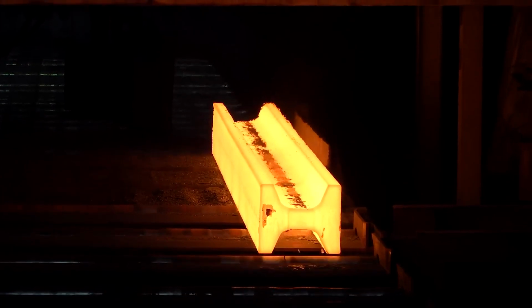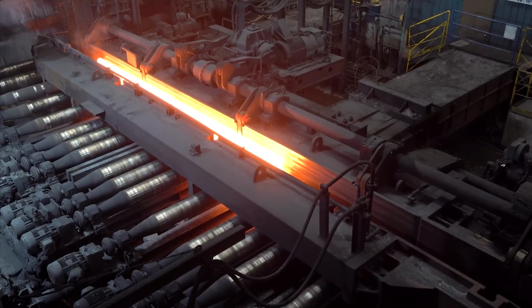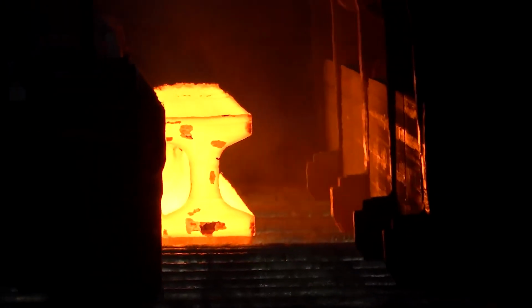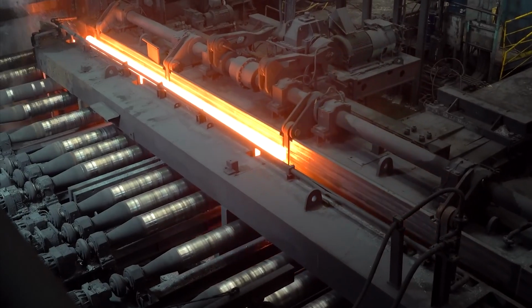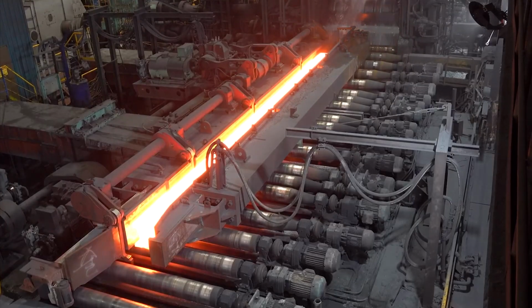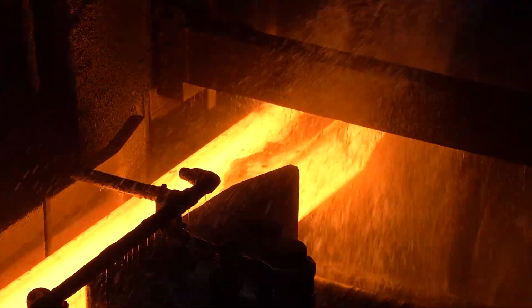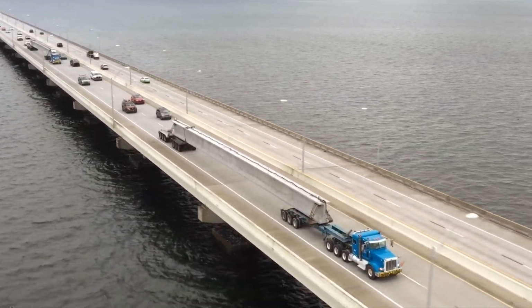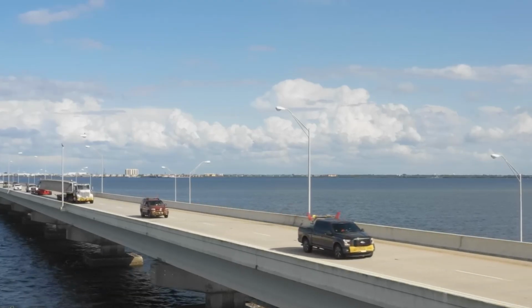There were also practical limits in fabrication and transportation. It was the most practical size to optimize factory productivity and ensure safe, efficient transport to the site. Unlike other systems, steel structures are manufactured under strict quality control in factories, resulting in high material uniformity. This ensures excellent predictability in load and deformation, leading to greater design reliability.